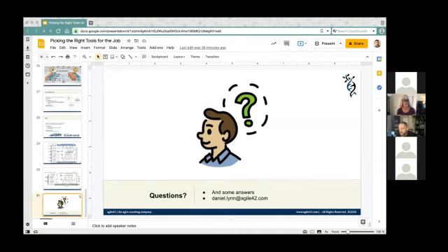Nicole asked about LeSS, SAFe and flight levels: is there an appropriate size organization for each? They all approach that differently. I'll hit LeSS and SAFe real quick. LeSS is really designed for 10 teams or less on a particular product. They've added in something called LeSS Huge, which extends it a little for bigger groups. I have to admit I haven't worked with LeSS Huge, though I've worked with LeSS plenty of times.